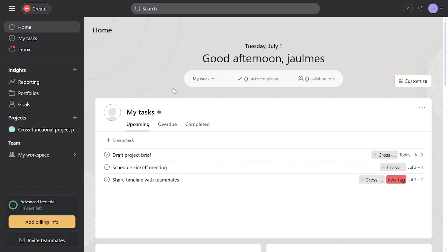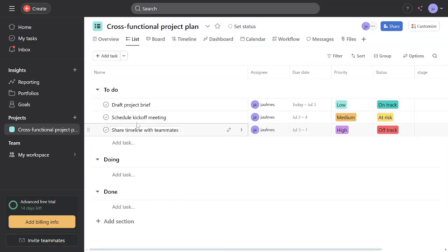Today, we'll be diving straight into how to create dependency relationships between tasks, a crucial element in successful project management. The first step is to identify your tasks. This means listing out everything that needs to be done in your project. The reason we do this is to get a clear overview and to avoid missing out on any important tasks.